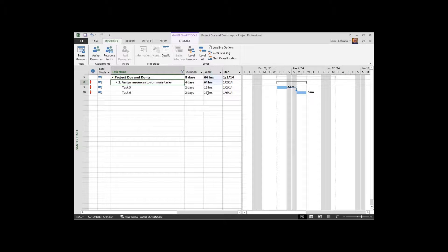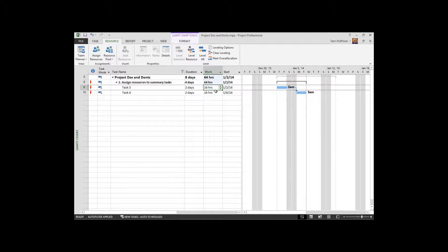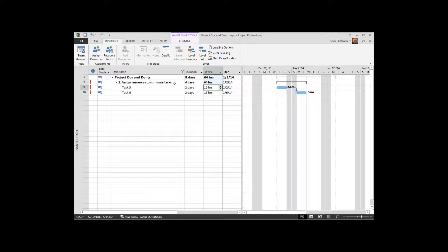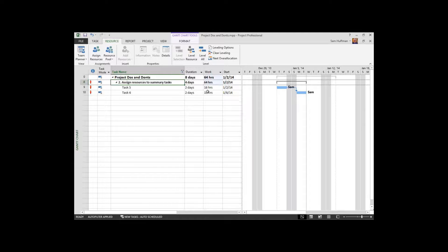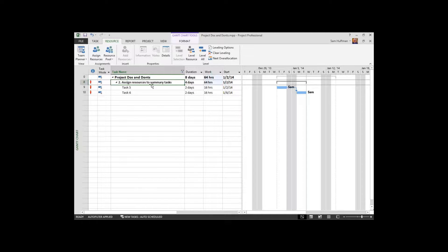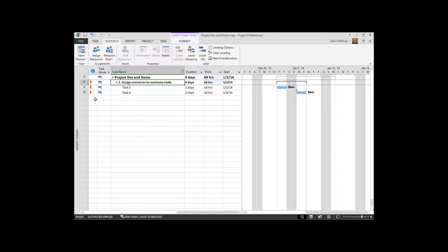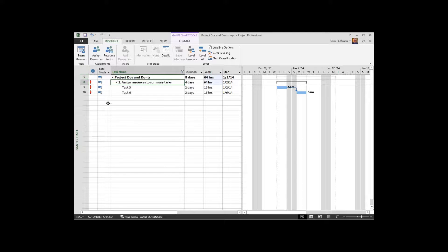Now, 16 and 16, two days on each of those two tasks, but when you assign the resource to the summary task, it's assigned for the entire duration. So I have taken the amount of effort and doubled it with the one assignment. And yes, you can see on the left-hand side that we're getting the over-allocation icons.